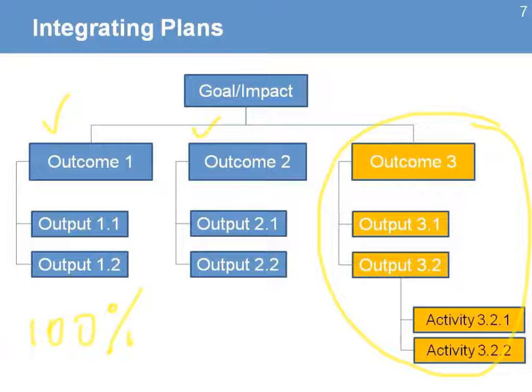So when we were working with the team and developing all those plans, we identified actions that we need to do that were not part of the activities in the log frame. Activities, for example, reducing the impact of a risk, or training of your team, or building a relationship with the stakeholders, or producing reports on information needed to build capacities and the understanding of the project by key stakeholders. All those activities are not in the log frame. They need to be part of the project and they need to be part of the WBS.